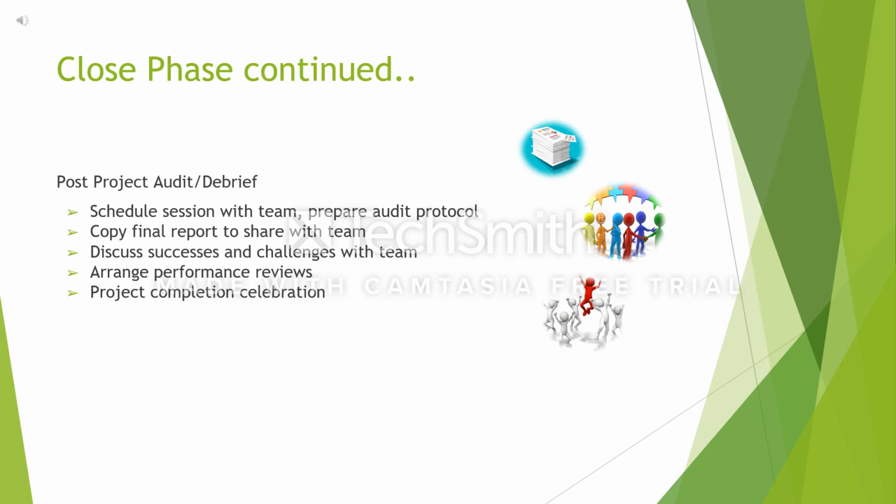A post-project audit and debrief checklist will also be needed. This list would include: schedule session with team, prepare audit protocol, copy final report to share with team, discuss successes and challenges with team, arrange performance reviews, and project completion celebration.